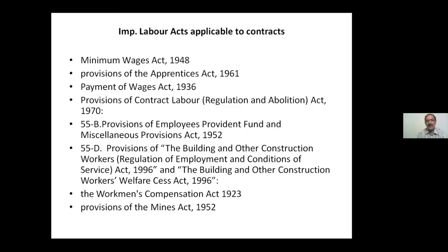As per this, when you are making the payment to the contractor, you will be deducting some statutory deductions. For example, GST you will be deducting, IT, income tax you will be deducting. Then you have to deduct this cess also. This is called labor cess. It is equal to 1%. So finally, you will be passing the bills for the payment. You have to recover all these statutory deductions along with this labor cess, that is 1%. Then only the net payment will be made to the contractor. So what is the percentage of cess as per this act? You have to say 1%.